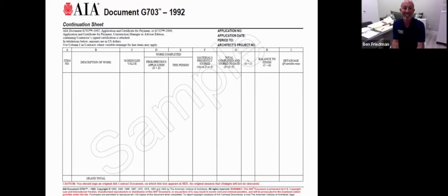So now you're going to see that in the retainage column on the right, that if we're holding back 10% on a $100,000 pay application, a $75,000 pay application, a $500,000, whatever it may be, it'll show that retainage all the way at the bottom through the algorithm has now added up to, in the end, 10% of the total value of the contract. And that ultimately will be what the contractor will look to bill out for, either throughout the process as they complete stuff and punch stuff out, or at the end.